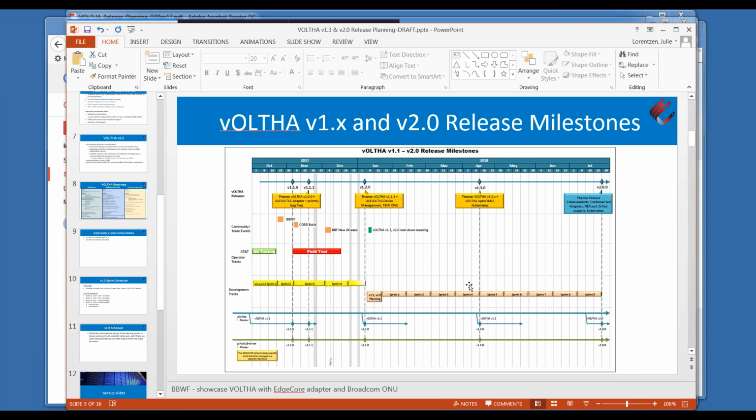So the sprints we have leading up to 1.3, you can see we have the planning session. Included in this time is the lockdown we have this week that Sean has coordinated. And then also some time allocated for developing and inputting epics and user stories into JIRA to support the work that's required in the following sprints. So then we'd have 3 working sprints effectively for developing the new features, and then a final hardening sprint, which would be sprint 4, leading up to 1.3. And then after that, we'd have continued sprints working on 2.0. So that's a high-level snapshot.